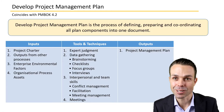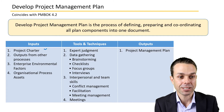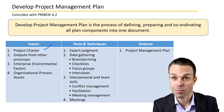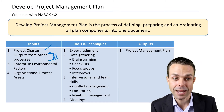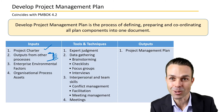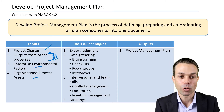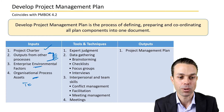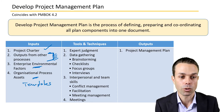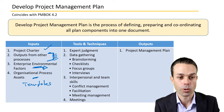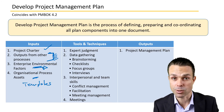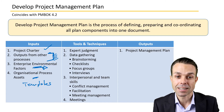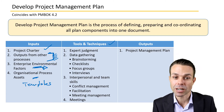The inputs, tools and techniques, and outputs for this process: inputs are the project charter, outputs from any other process — risk, quality, schedule, cost — all going into the project management plan. Also enterprise environmental factors and organizational process assets, such as templates, organizational politics, regulations — all of that goes into the project management plan.